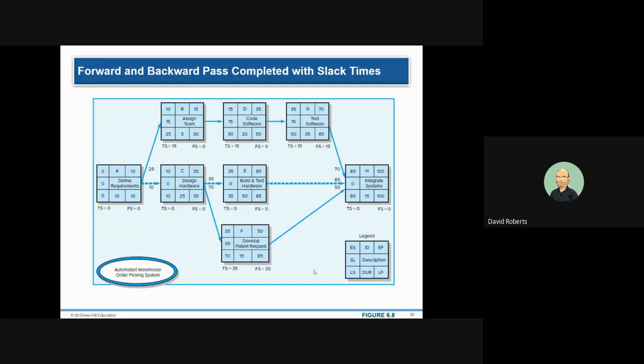In that particular case, just focus on total slack. The total slack tells you how long you can delay an activity without delaying the entire project. Now, if you see the number at the top, like the path, the total slack is 15, 15, and 15. That's not 45 days of slack. That's 15 in total. So if B gets delayed by 3 days, you'll have 12 days left for D and G. So the total slack is more important than the free slack for our purposes.